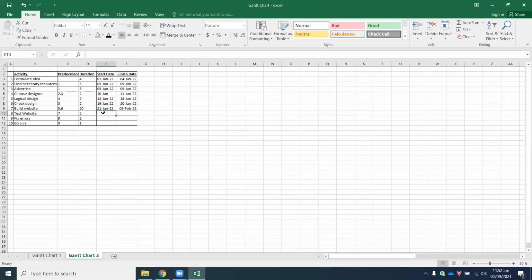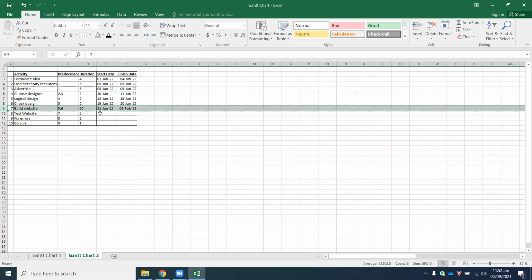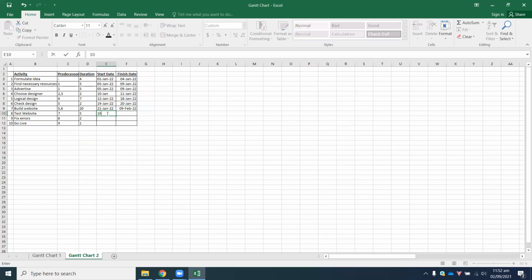All right. Now, the 8th activity is test website, and the predecessor is 7. So your 7th activity finishes on the 9th of Feb. So you'll give your start date as the 10th of Feb 22. So 10 plus 5 gives you a value of 15. Minus 1 will give you a value of 14. So 14th of Feb and then 22.